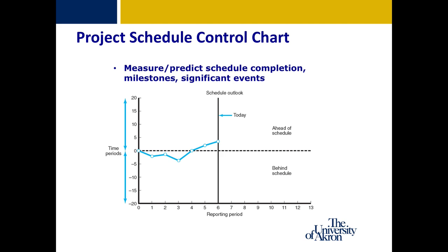The textbook mentions this type of graph is particularly effective with project milestone events. Project milestones are significant events that have no duration associated with them. Some examples include a project approval step, the requirement sign-off step, and the approval to go live with a particular project.